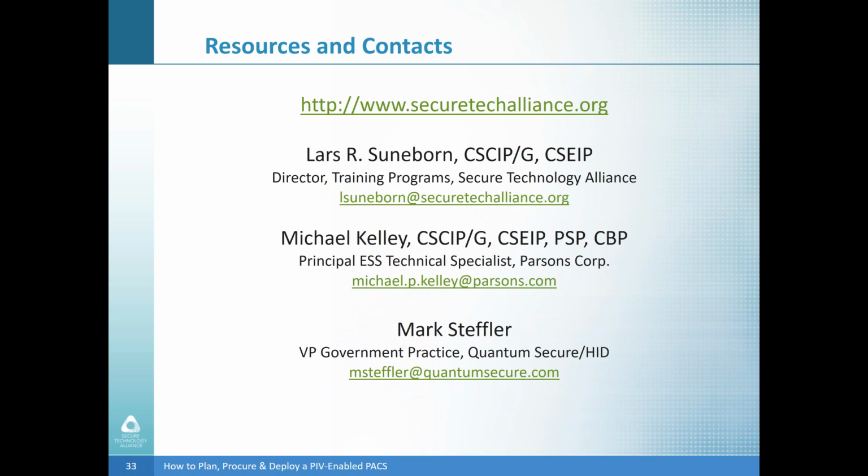There is also another GSA site, gsa.gov, for the Schedule 84 contract vehicle. In there is a statement that all the equipment shall be selected from the GSA APL that you can find on the idmanagement.gov website, and the proposed equipment shall have the approval number for all the categories: the PACS infrastructure, the certificate validation system, and the readers.